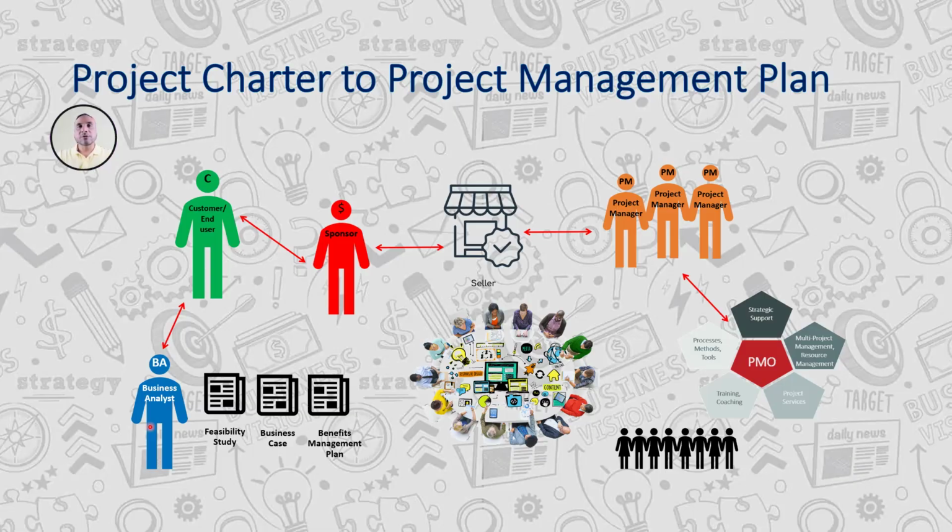In the needs assessment process, business analysts try to find out multiple ways to reach the vision of the organization and what the gaps are. Then those feasibilities are presented to the board or the shareholders, and they decide which project or which option to start with. So the option is selected by the board or by the chairperson or by the shareholders or stakeholders.